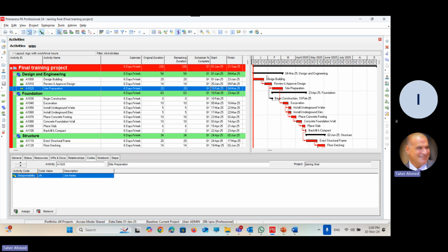Grouping the activity by time is very important for the operation, just to tell them what the activities will be in each month. Group the activity by the responsible manager. It is very important to tell everyone this is your responsibility. Group the activity by department. It's very important to tell every department in our company that those are the activities you are responsible for. So choosing the grouping and sorting can generate an unlimited number of views of layout, which can be used as a report to be distributed to the team.